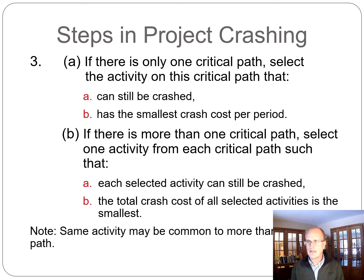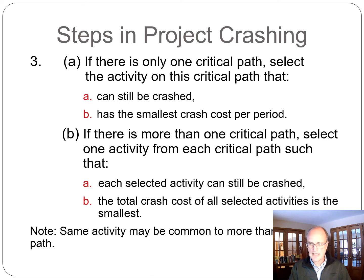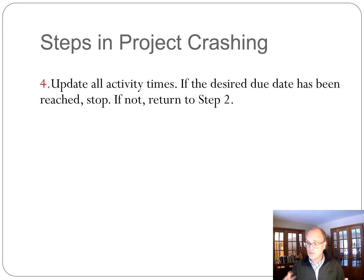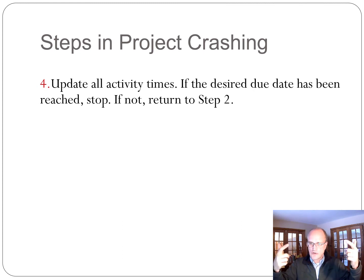The tricks that can be introduced are: something else becomes critical, and you have to choose between one or two options when there are multiple critical paths. Those are really the two things to particularly pay attention to. The last step is to re-evaluate: redraw the network, update the activity times. Have you shortened the project as much as needed? If yes, stop. If not, look at what your critical paths are — they might have changed — and go back to step two.